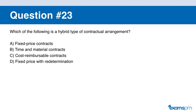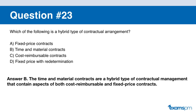Question number twenty-three. Which of the following is a hybrid type of contractual agreement? A: fixed price contract. B: time and material contract. C: cost reimbursable contract. D: fixed price with redetermination. If you said B, you are correct. The time and material contract is a hybrid that contains elements of both cost reimbursable and fixed price contracts. Also note: 'fixed price with redetermination' is not an actual PMBOK term — if you see unfamiliar terms, they are likely not the correct answer.